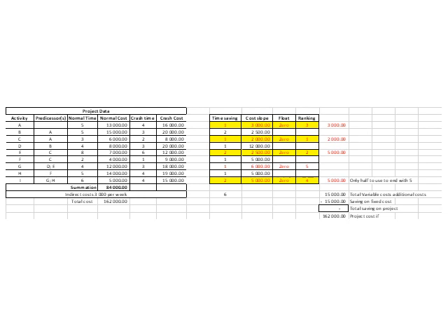Some of you actually quoted quite well, but if you want to have a look at it, please have a look on page 187, and you will see that the increase in cost over the reduction in time will give you your cost slope. In other words, it's your crash cost less your normal cost divided by your normal time less your crash time. So what we do is we calculate each one of those, and let me just get to that memo.